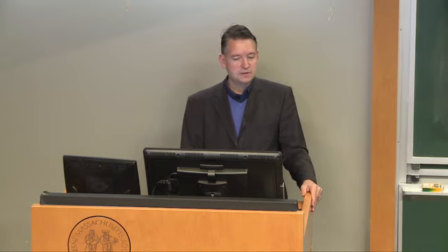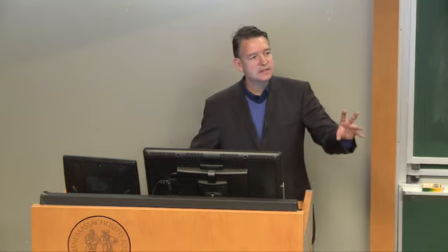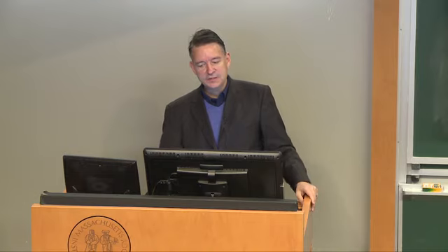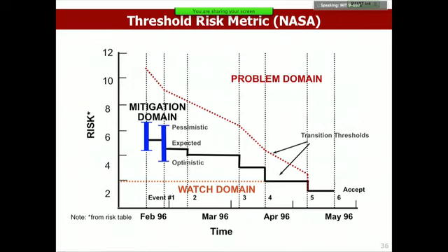So the question then is, what do you do with this? So the idea is you do your risk management, you identify your risks, you place them on this matrix, and then you track each of these risk items over time. So here's your 12 risk levels, right, between 1 and 12. That's the y-axis. And then on your x-axis, there's time. And for each of your risk items, people might disagree. Some people on your team might say, hey, look, this is not a big deal. We've seen this before. The impact is not big.